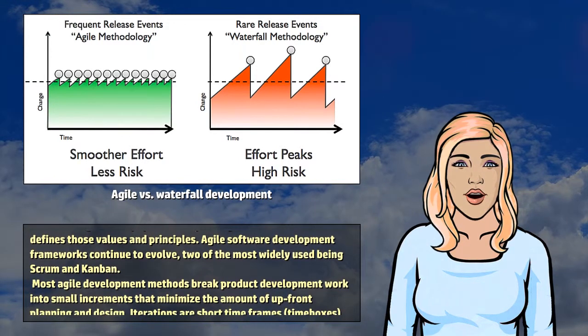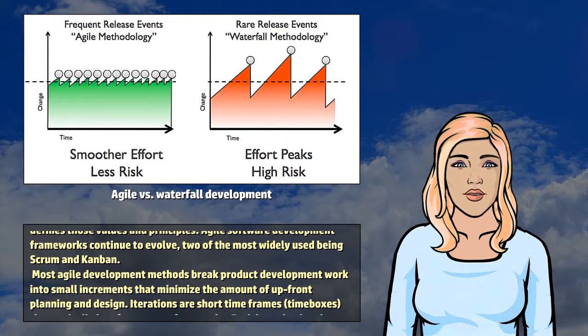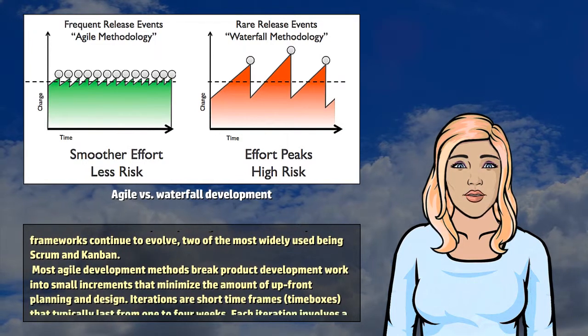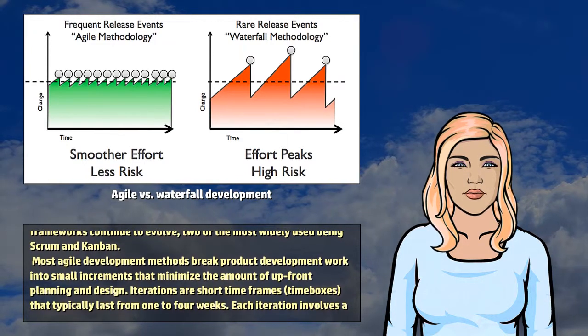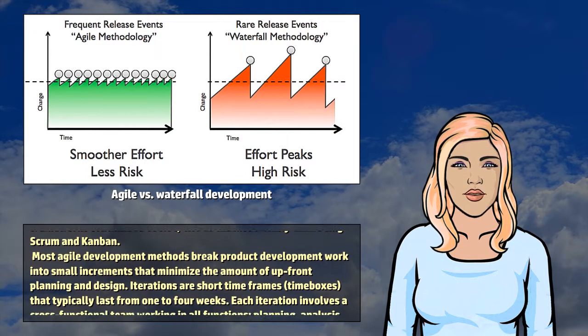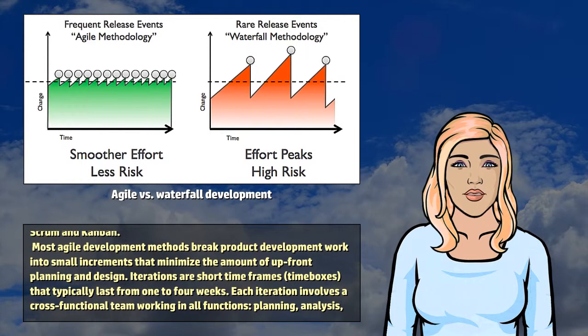Most Agile development methods break product development work into small increments that minimize the amount of upfront planning and design. Iterations are short timeframes, or time boxes, that typically last from one to four weeks.